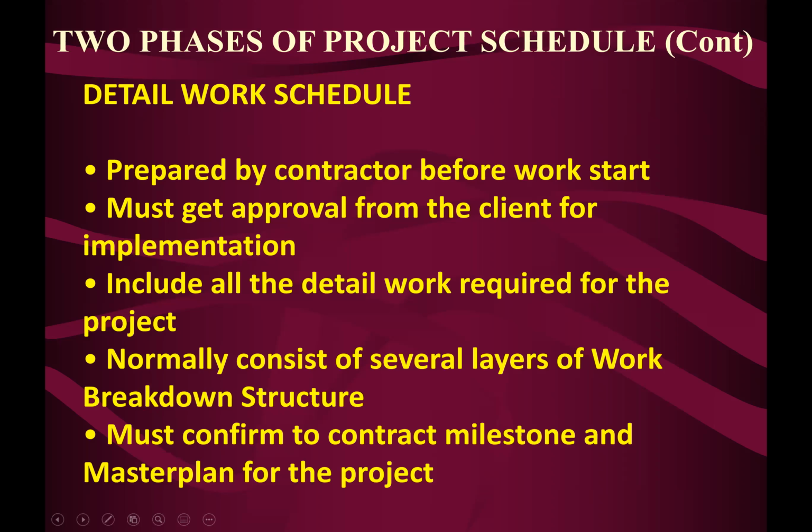The reason why we have a major work program and a detail work program is basically for reporting purposes. Who is going to look at those major work programs? If you are the boss or big director, CEO, COO, whatever, it is not necessary for you to know the detail of the work program. You only want to know when things are going to finish, etc. So you are given a report which is basically not that detailed.